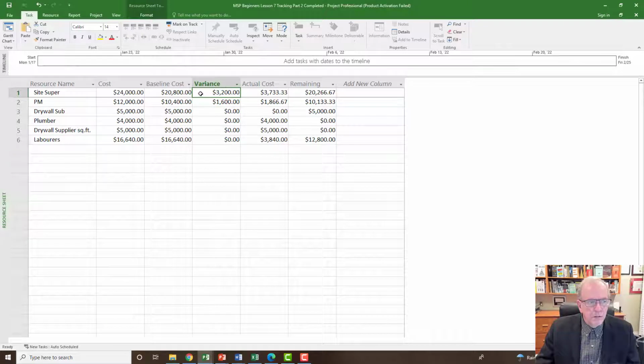If you recall, I was paying the site super $100 an hour. It's 4 days behind schedule. That's 32 hours. 32 times 100, 3,200. The PM, I assigned 50% to this project, so that's why that is 1,600. That would be, in essence, the equivalent of 16 hours: 32 hours, 50% of that time, $100 an hour. 16 times 100, $1,600. So that's where that's coming from.